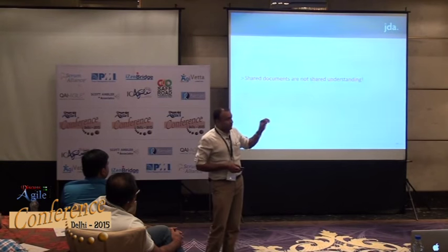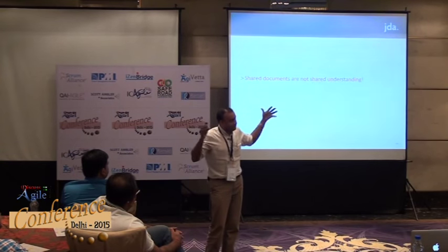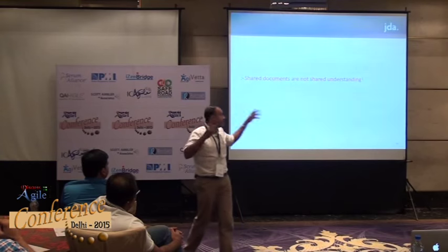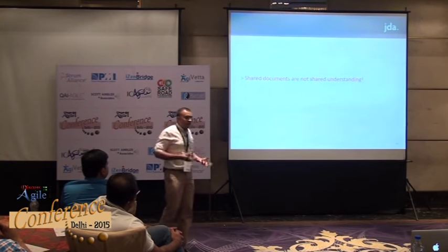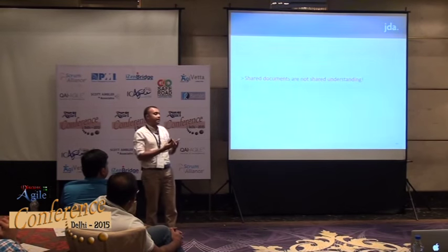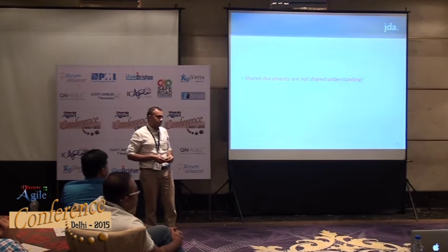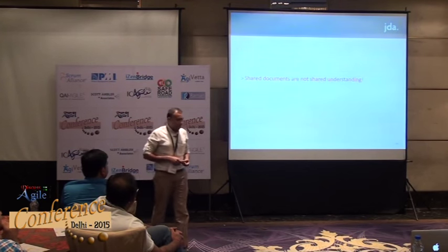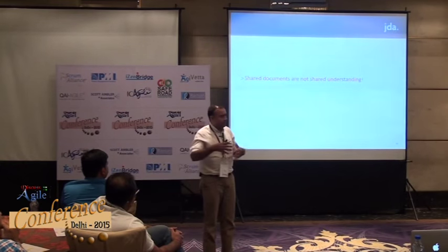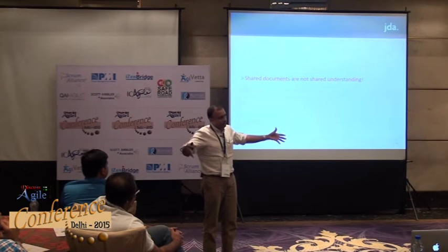The product owner comes with the user story, probably he initiates that, but it's the whole team's responsibility to make it complete. The story has to be evolving, it should be developed by the team, the whole team. But the product backlog is owned by the product owner. That's right. When you say the whole team, who is the whole team? The product owner, the product manager, the development team, or what? Development team, product owner, product manager, wherever, all the stakeholders will be contributing.